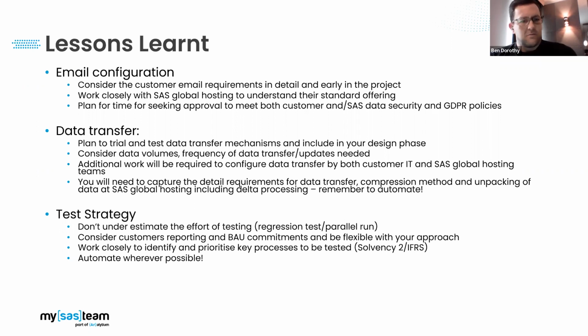And moving on to data transfer. Pavel obviously took us through how in this case study we approached the transfer of data. But again, this is something that needs to be trialed and tested quite soon in the project, back at the requirements and design phases, because there are many different ways you can meet the requirement of data transfer.